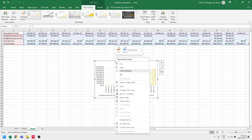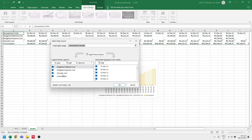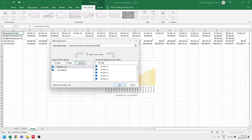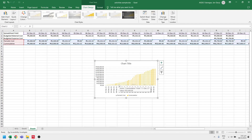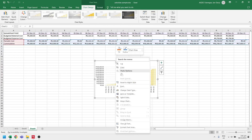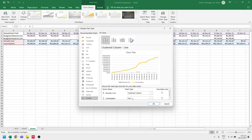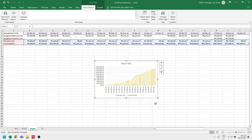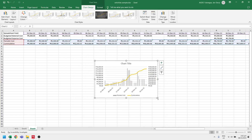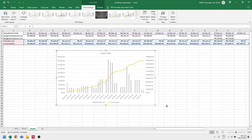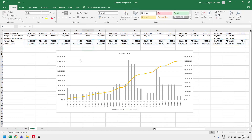After we tabulate the cost, we can grab this data. Go to insert and select any of these chart commands. Now let's right-click on the chart and select this option. Let's remove the budgeted expense cost and the budgeted material cost. Let's click OK. Now let's make the cumulative a line chart. Right-click the chart again and select change chart type. Look for the combo. For the cumulative, make sure the chart type is line and check the secondary axis. Now click OK, and that's it — you have transferred the S-curve from Primavera P6 to Excel. We can now expand this chart so we can see the values.